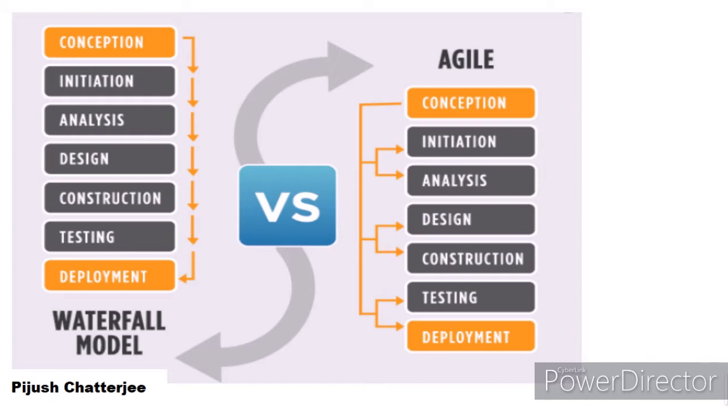But if you have a problem at any stage, for example, if you are in the testing phase and you find a problem that goes way back to the requirement itself, then there is a huge problem, because you might need to remove everything and start over. The further down the stream you detect the problem, the more costly it is from a maintenance or even development perspective.